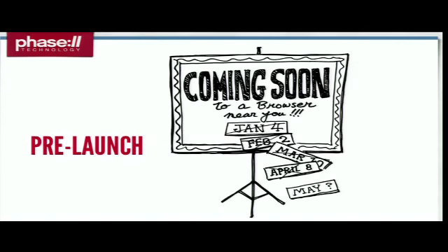I would say very much try as hard as you can not to set a launch date in stone, because if you're building a project to a date, you're always ultimately compromising what you want to deliver. If you're basing a date on what you're able to deliver, you're going to have better client satisfaction, a better launch, and things are going to go much more smoothly.